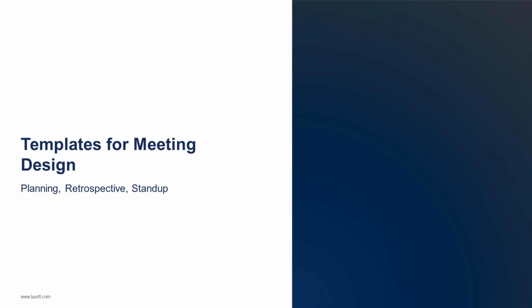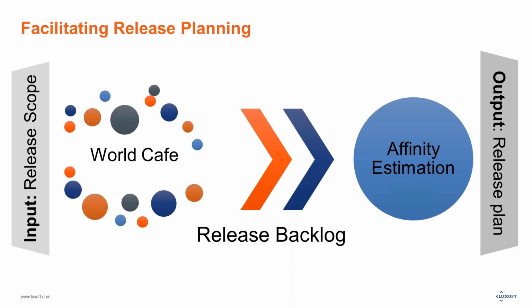And we are going to templates for meeting design. So here is the template. Probably on one of the webinars you saw something similar. This is a template for facilitating a release planning session. First of all, as an input for this session, you can have some release scope. Then you can use the World Cafe technique, when participants are discussing the release scope details with one another.